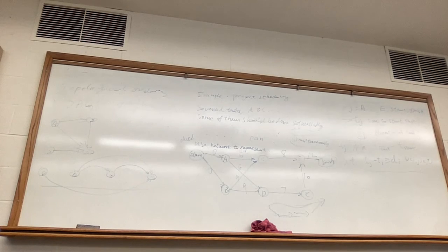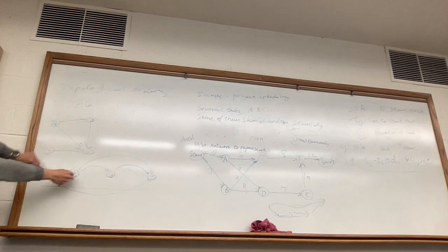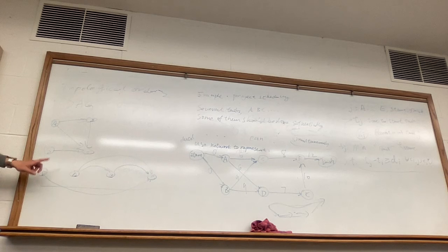So you see that if we order the nodes in this DAG in this way, D, A, B, C, or actually you can do it as A, D, B, C, you can switch these 2, it doesn't matter. If we order these nodes in this way, then the arcs only go from a left node to a right node, but there's no arc going from a right node to a left node. Why is the topological ordering important?